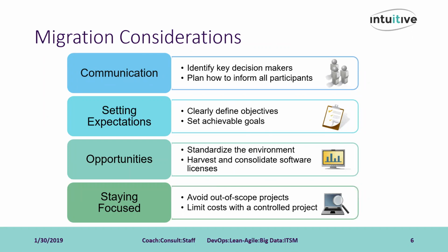We'll build a project communication plan and stick to it, or at least make sure any changes are recorded in there. This should include weekly project status calls, bi-weekly project reviews with the project sponsor, keeping the team and the stakeholders informed of the progress and status of any changes to timelines, etc.